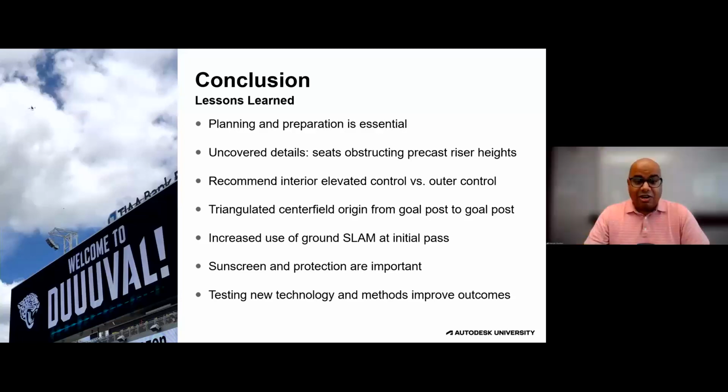And then, talk about game of inches, right? Talking about a 4-inch line and trying to find the center point of that. So the team did a great job finding that. But one of the other things that we quickly found out is the use of SLAM was great, but it could have come before the actual terrestrial scan. And I think that would have helped the team a lot in capturing the area quickly and also help them plan where you want those detailed scans to take place.